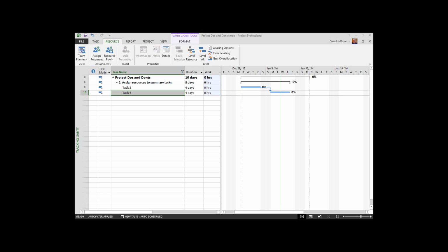A week, 5 days, is a work week. 7 ED, or if you were to type in 1 EW, that would be 7 elapsed days. A month, I believe, is 20 or 22 working days, but in elapsed units that would be 30 elapsed days. So there is a large difference here, and bear in mind that we're talking about contiguous or consecutive time. So when a resource is assigned one of those tasks, you get into some fairly large effort units.